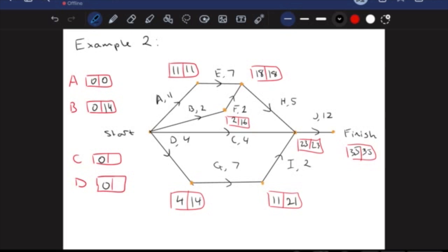So if you're a project manager looking at which activity you want to do first between A and B, this guy here can probably wait because we have 14 hours that we have to play around with before we start it. A is the more pressing option. Now, going backwards here as well, from this vertex back to here, our activity C just takes 4 hours to complete.